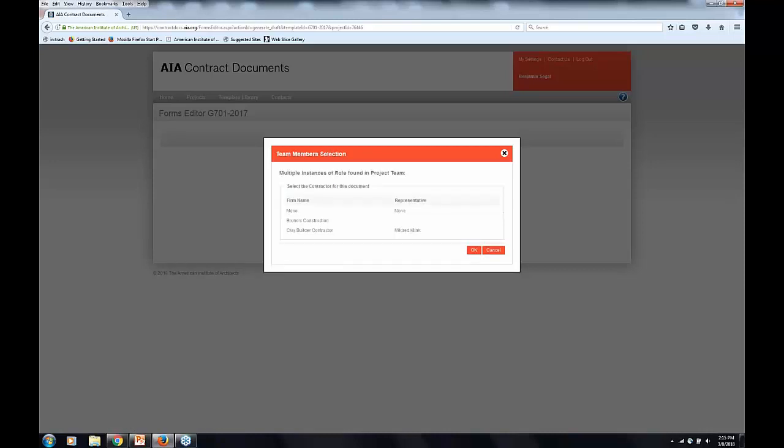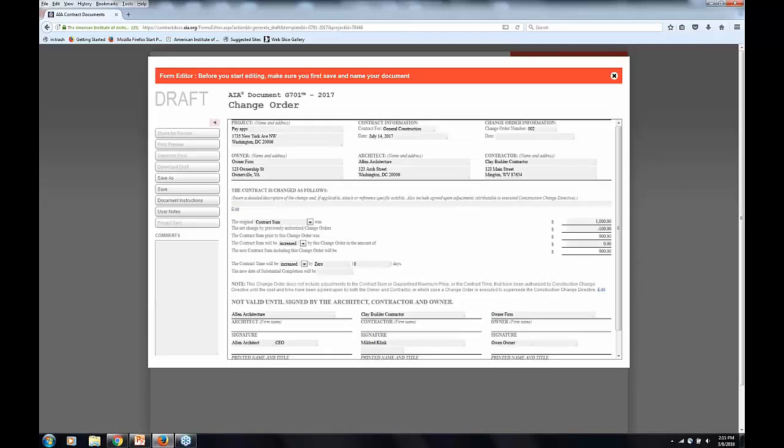So now it's going to create a new change order, and it's going to give me the information from the prior change order. So original contract sum, prior change order was -$1,000, giving us a total of $900 prior to this change order, and then I can say maybe this is increased by 100 or so, and that gets us to that amount. So again, this is just simple math here. By selecting import, I import the previous amount, and it gives me the amount prior to change order.